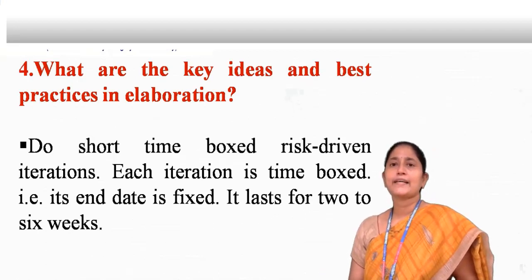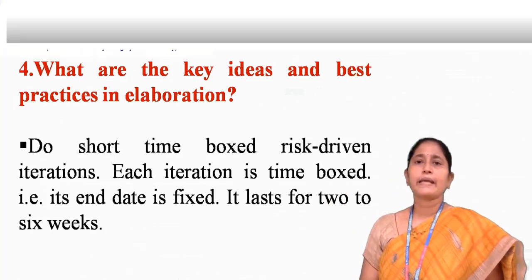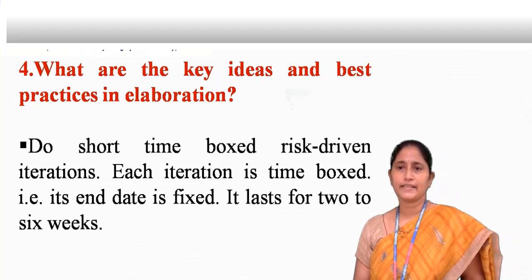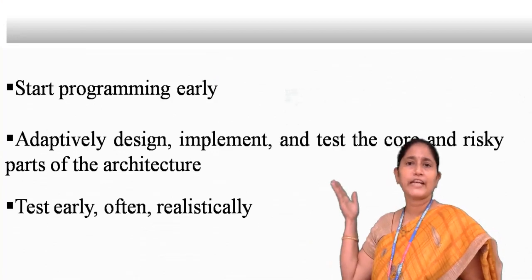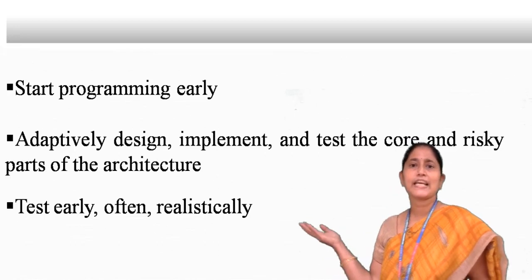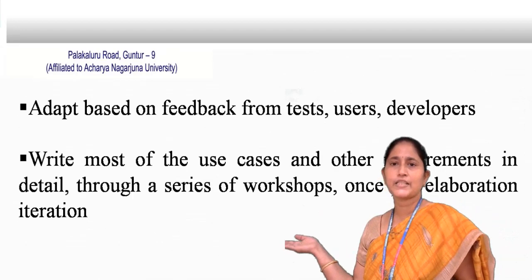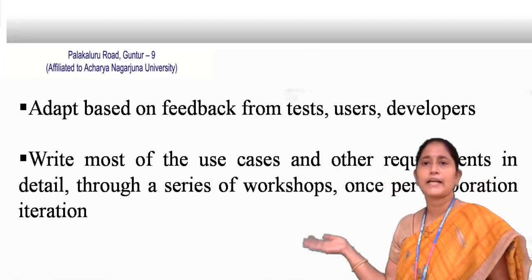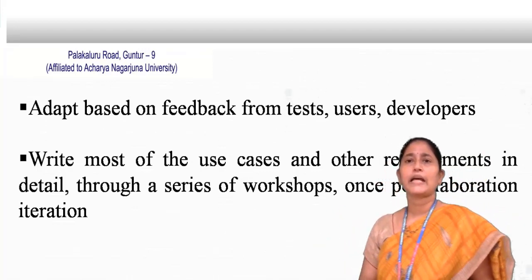The key ideas and best practices in elaboration include: do short time blocks and risk-driven iterations — the end date is fixed and iterations last two to six weeks. Start programming early. Adaptively design, implement, and test the core and risky parts of the architecture. Test early, often, and realistically. Adapt based on feedback from test users and developers. Write most of the use cases and other requirements in detail through a series of workshops, one per elaboration iteration.